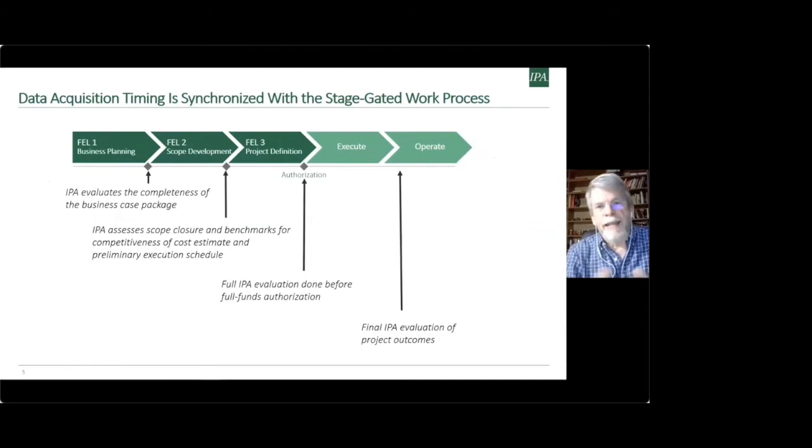So as part of our data collection interview process, we interview project teams at various stages in the life cycle of a project. If you're unfamiliar with this kind of a chart, the first three segments are really elements of what we call front-end loading or many call it pre-project planning or project definition. Most of our client organizations, industrial capital project kind of owner companies, break their front-end loading into three distinct phases. And so as part of our benchmarking, we will collect data at the key junction points in this three-phase front-end loading process.